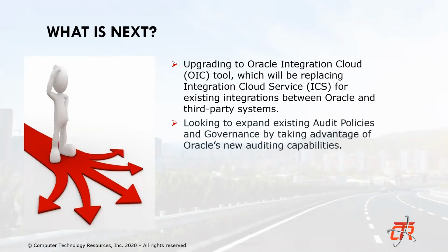They're telling us it's about a 4-month process. We're hoping it takes around that time, maybe a little more, but we're going to take our time, make sure everything works. We won't cut over until everything's good and we test it. Again, a lot of planning, even though this is somewhat seamless to the business. As far as them being involved, it's more for my team. It's all of the integrations, all of the interfaces, all of the reports. It will affect the business, of course, once we go live, because then they're waiting for the results, right? But they won't be involved with regard to the testing.